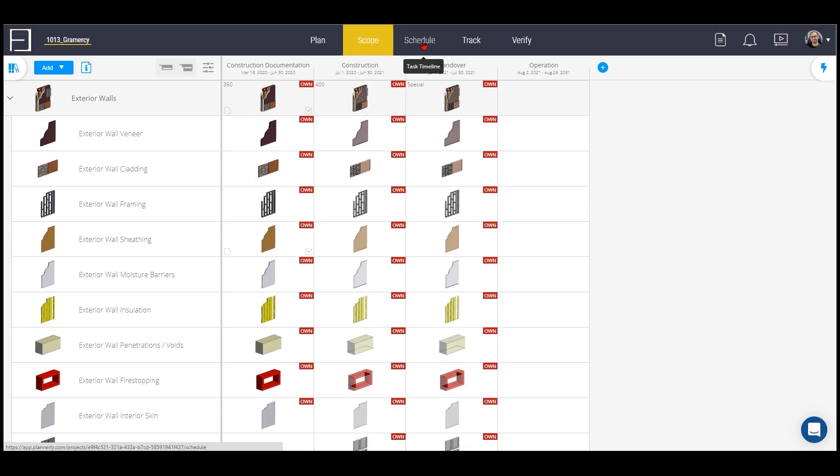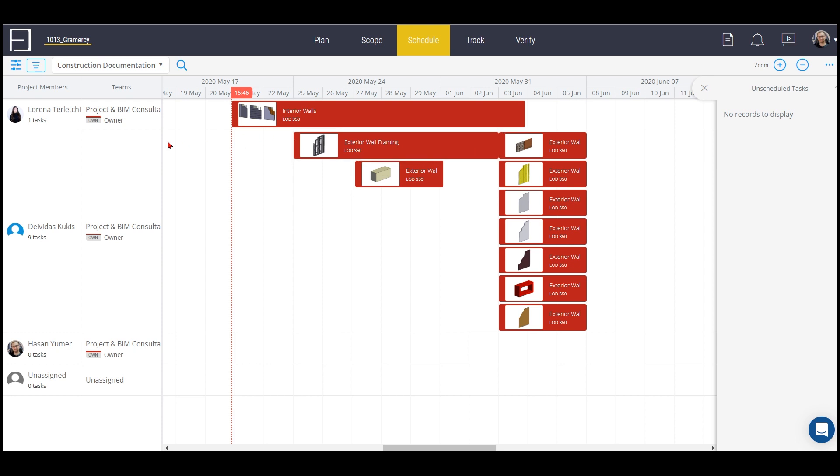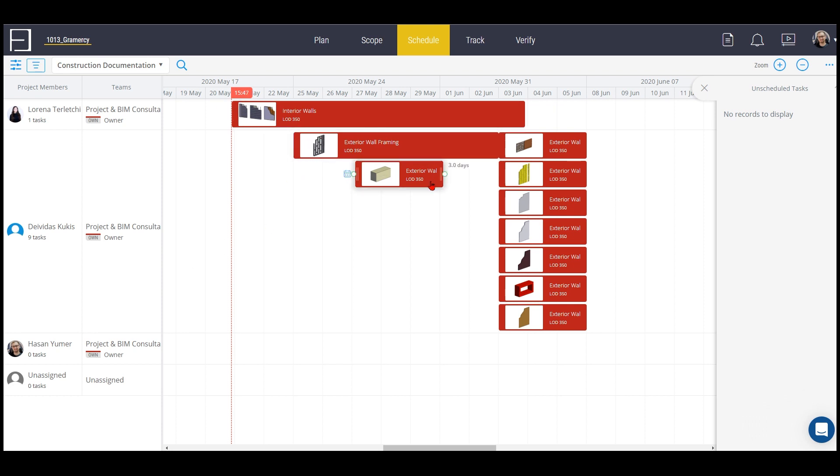One of the best parts of the schedule is that you can actually arrange a volume strategy. For example, one of my colleagues will focus on the exterior wall framing while another colleague will focus on interior walls so they don't really clash. They can at the same time work and collaborate and they will not even interfere with one another.